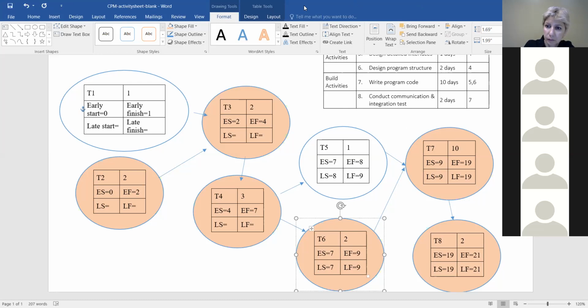Quick question. If there was a buffer, how is that buffer determined in a professional setting? Usually people have rules of thumb, 10%, 15%, 20%, they add to the end of the project. Some people add to the end of their phases. Some people add to each given task if those tasks are complicated. So buffering is a whole new topic. There are different methods for buffering, different rules of thumb. This is just a very general idea I gave you.